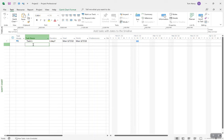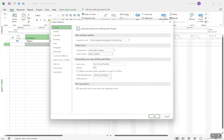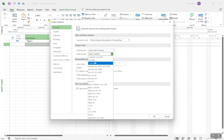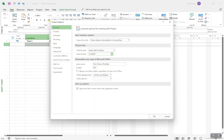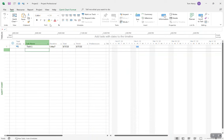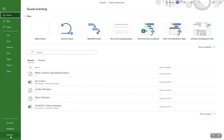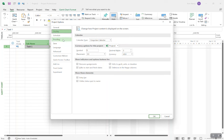Next, let's talk about Project Options — File, Options. This is how we set up our preferences. Date format: I always come in here and set it to 1-28-09 format. Display: you can check the Entry Bar checkbox to get an Excel-like input bar — that is a money tip right there. In the Schedule section, my project week starts on Sunday; adjust that if needed. Fiscal year you might want to adjust for cost calculations according to your fiscal year.